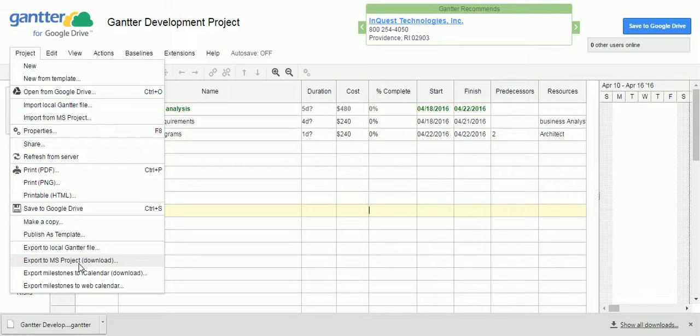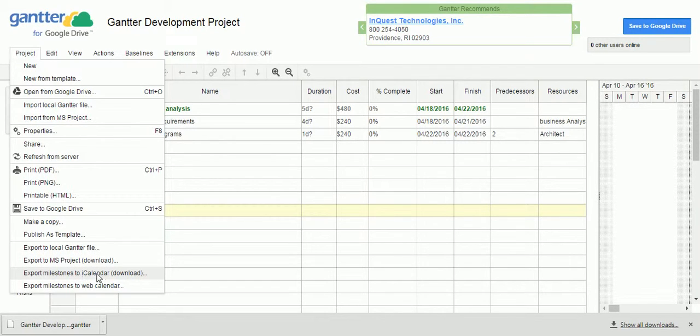You can create a Gantter project here and you can import in the Microsoft project plan software as well. And here you can export miles to the calendar. It is going to represent like a web calendar link. When they click on it automatically, you will navigate to this particular Gantter. These are the couple of options you can export the Gantter project in different format.